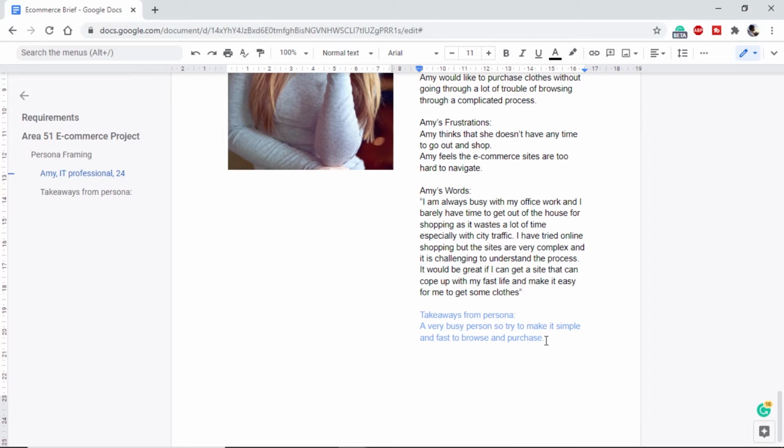So this is how we can meet with the clients, get the requirements, and make a brief that will explain the deliverables that we will deliver once the project is completed, and what we will not deliver. It is very important to keep both points, also the cost of the project and the extra price that will be charged if any additional work is done. Lastly, we use the target audience and some research to frame our persona, based on which we will be able to design our UI.